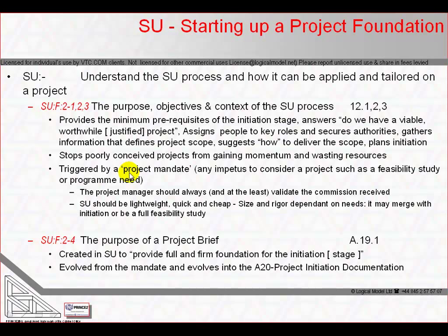Whatever we receive, the project manager should always check it. For example, has a feasibility study already been conducted, and if so, are its conclusions politically and technically sound? SU should be a quick and cheap do the minimum process when compared with the initiation stage.